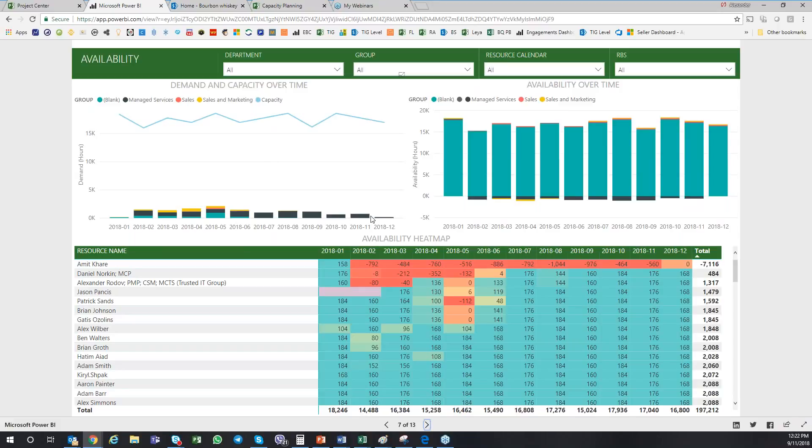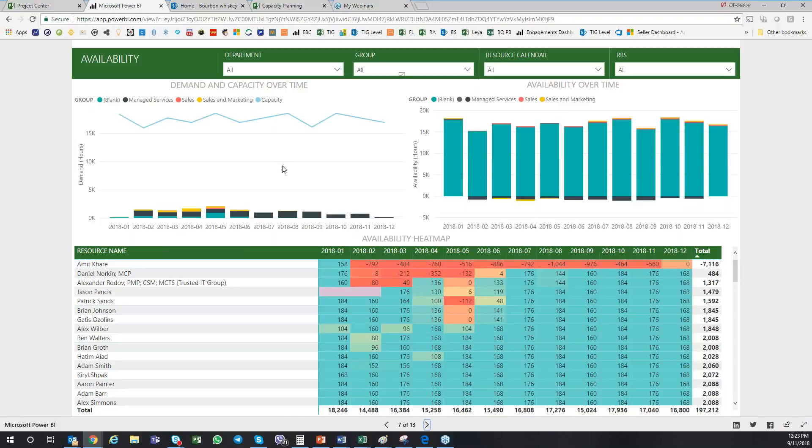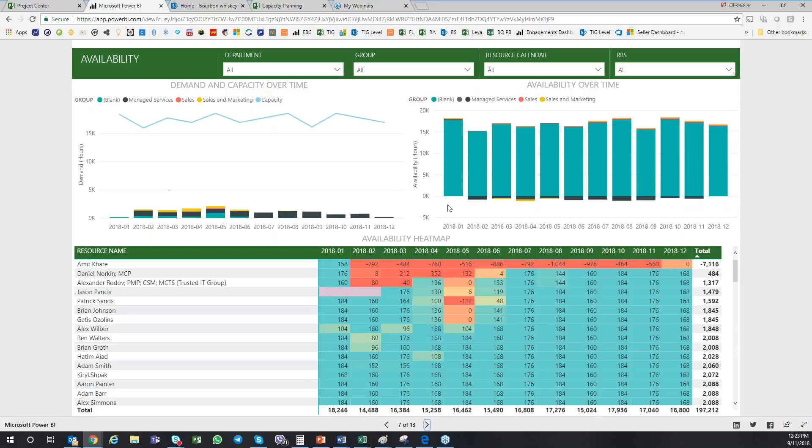Obviously we have a demo environment where we don't have all the resources assigned 100%, this is where you would see that, okay, my organization has underutilized resources. But you can see that some of the resources are very in high demand. So even though organizationally I am not utilizing everyone from the overall perspective, but individually I can see that I have some individuals that are requested more than others. So somebody's plate is not as full as others' plates. That's something that this kind of insight you can get from some of these dashboards.